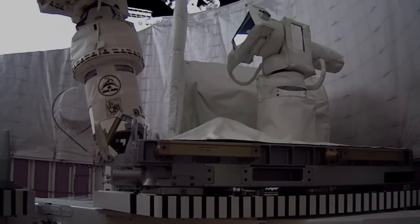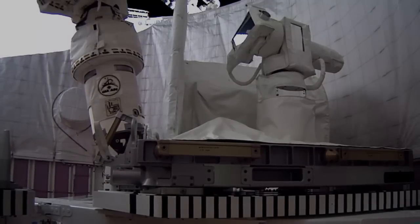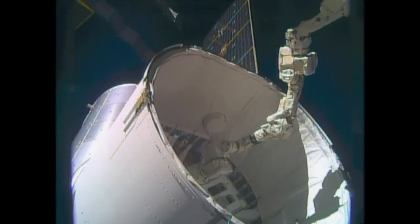Once we're connected on Monday, that's when we've connected to our power lines and our data lines, so we can send commands just like we can send data over the internet through the space station's communication system. We'll send commands to turn heater power on first. We'll then turn our computer on and start talking to our computer to make sure that things are checked out okay and things are healthy, so that we can continue towards hopefully a successful laser communication demonstration in the next several weeks.